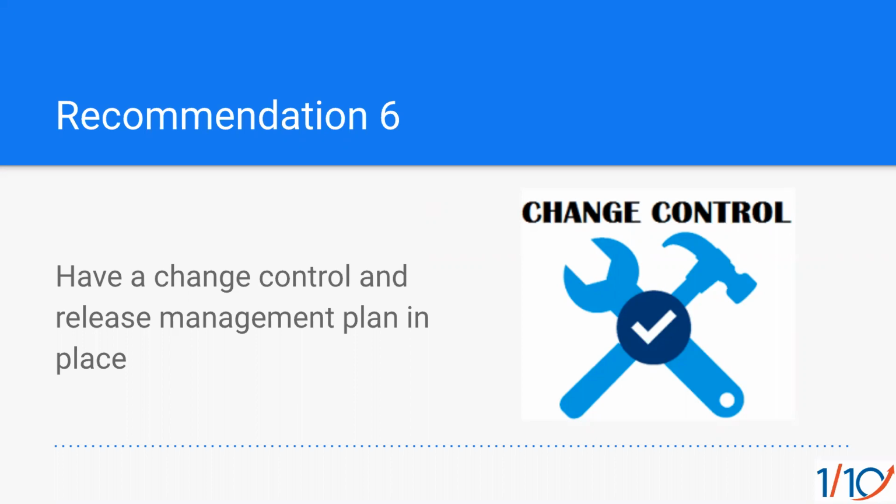And then have a clear schedule, a release management plan on how you plan to address it. Let's say that we will address mission critical issues immediately, we will do data fixes weekly, and we will do enhancements on a monthly basis. Having a clear plan and roadmap for the types of changes, it gives people a lot more patience with the system. But if they just are frustrated and have no visibility to how things or when things are going to get changed, that leads to a lot of frustration and just poor user adoption.